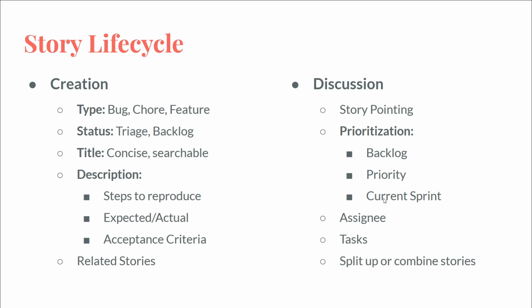And then you may need to split up or combine stories. So you may say, okay, we've discussed it, we understand the ticket, we've pointed it, but it's a really big point. Is there any way that we can break this into smaller stories and do them incrementally so they'll be easier to get done faster and easier to review? Can we break this up so it's not a ton of work for just one person to do?